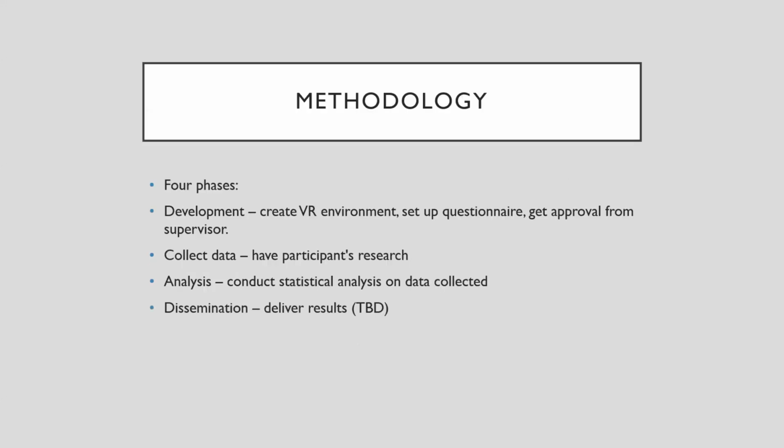So I have 4 phases that are involved with my project. This kind of goes along with the timeline where I'm going to be developing the VR environment, developing the 2D environment. I'll be testing in each environment and then getting the results. So developing that, I'm going to be doing from December till about mid February. And then for the rest of February, I'm looking to do the data collection.